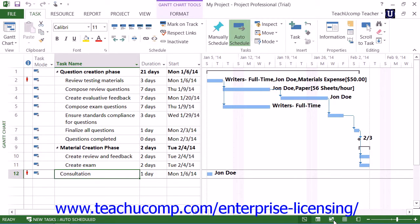If you are using Microsoft Project Professional 2013 or 2010, you can make use of the Team Planner view to easily assign and manage multiple project tasks and work resources simultaneously. This view also shows how the work resource assignments you make impact other work resources within the project, so you can make additional changes as needed when assigning work resources to project tasks.